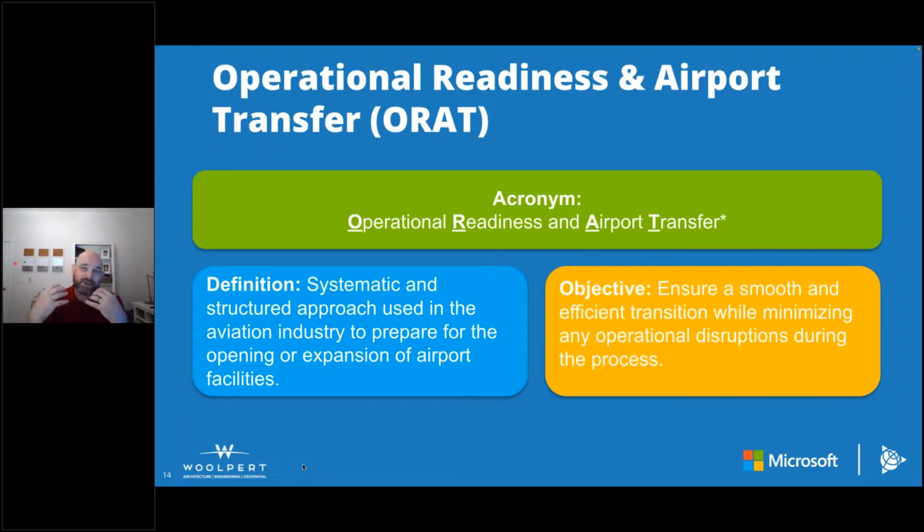So when we have a large capital project, a renovation, a new system being implemented, all the way up to a brand new terminal, it's the idea that we want to, in parallel with the design and build of that facility, start looking at how that facility is going to be operated, so we can put ourselves in the best position to do so once it's handed over. And ultimately, we're trying to achieve a smooth and efficient transition from basically static operations of the facility to dynamic operations without any disruptions in that process.